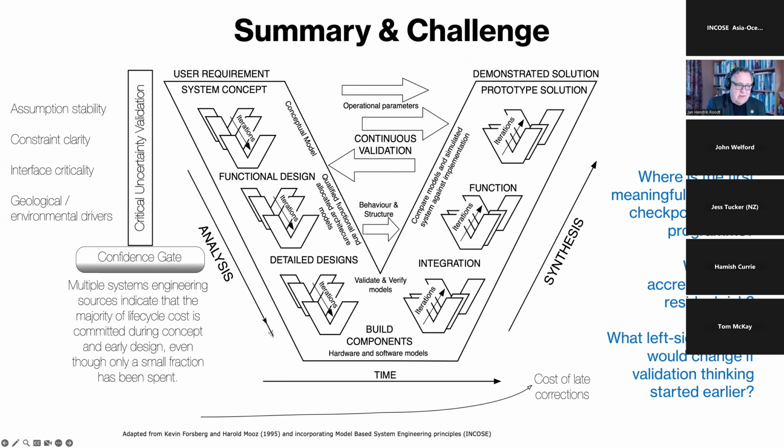And so you have a confidence gate almost that you shouldn't pass until certain things are really discovered, like assumption stability, the constraints that are clarified, interface criticalities, geological and other environmental drivers, etc. And in New Zealand, also cultural aspects of big projects. So all of those things tend to sit on this side here.